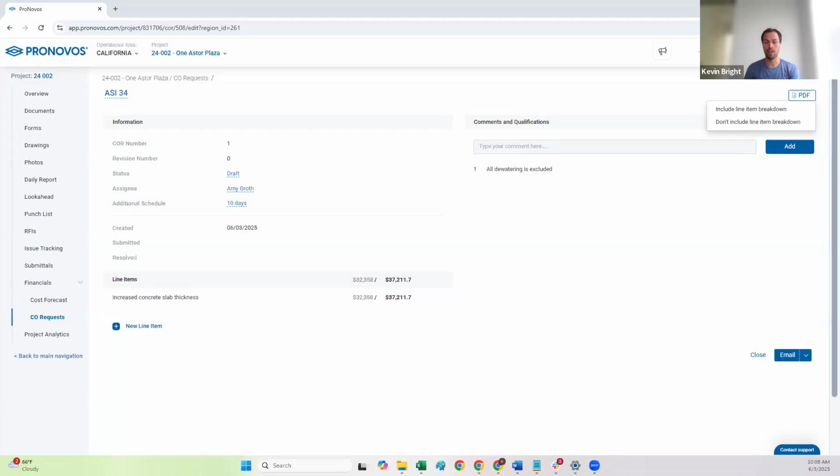One of the workarounds we've suggested to people, it's not perfect, but when you're adding the bond rate, you can just add the markup to it. So if you say, hey, we always have a 15 or a 10% markup, instead of just having a 2% for your bond rate, you could put in 2.1%. So that's one workaround, but that is something that we're looking to add, is the ability to apply those miscellaneous and other percentages to the contract price and not just the cost.